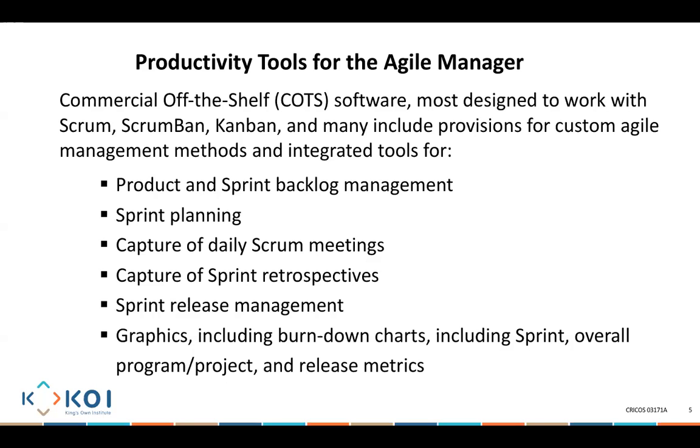So we talk about product planning. We talk about the product backlog. We talk about the sprint backlog. In other words, if the product I would like to deliver is a software application, and that application has 50 features, then I have something called a product backlog. For every feature that I would like to deliver, I usually write one user story, and that user story is written in the form of a person, the user who needs to be doing the job.